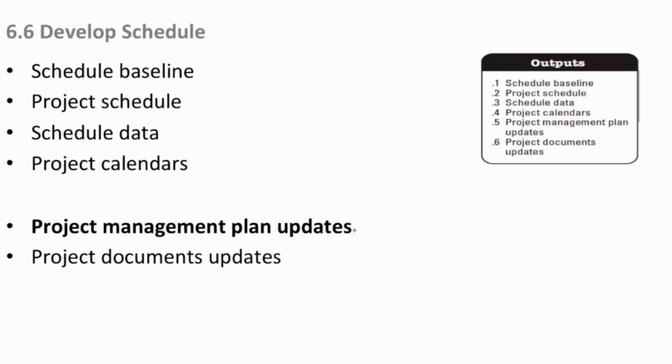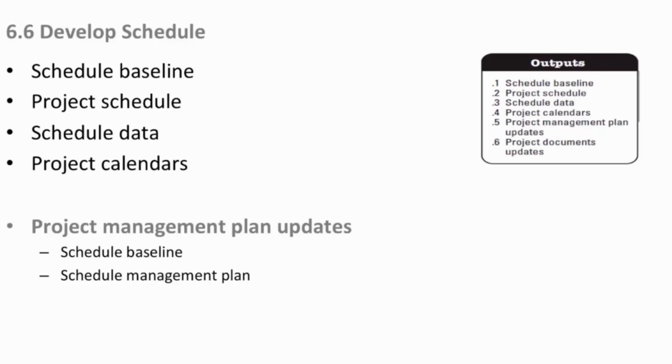The project management plan may possibly get updated, actually it will get updated when you baseline your schedule. Whenever you baseline anything, your project management plan gets updated because it's a component of that. So obviously we're going to update the plan at this point with that baseline. And if we made any adjustments to the actual management plan based on our experience with working with it, we make those adjustments too. And again, not limited to just these things, could be others.